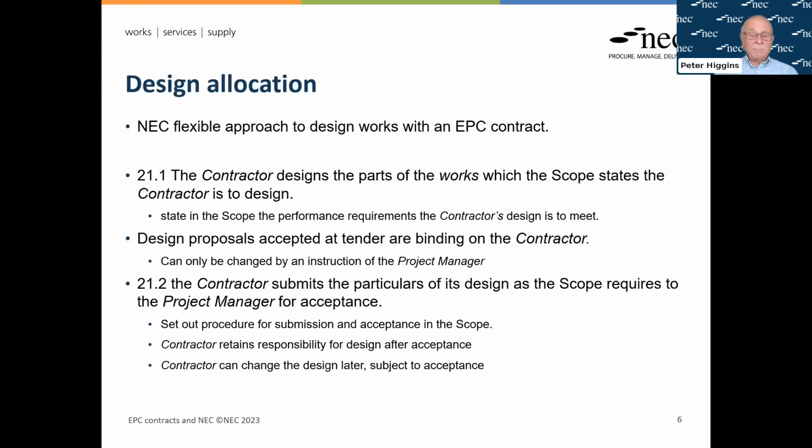And Shai's mentioned that it's mainly used for more complex projects, which is great because you've then got specialists helping to prepare this, but you can also use it for simpler projects. And there you need to be clear in the scope as to what it is you're looking to get from the contractor by way of design details so that you can say, yeah, I'm happy with it. Now, once you've accepted that design, the contractor still retains responsibility. There's no transfer of liability for that design in acceptance.